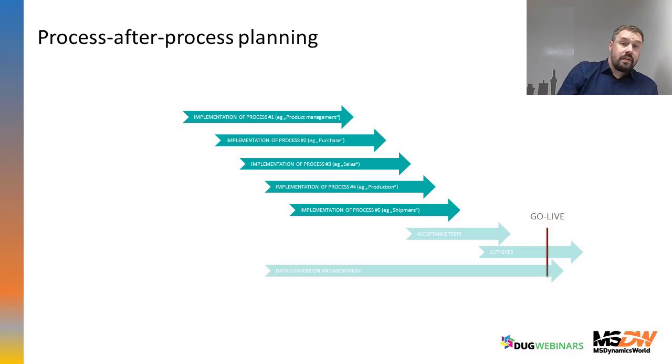And this is a closed process. It has its start and finish. So you can implement and develop this process alone and give it to the customer, and then you can start with the purchase process, the sell process, the production process, which needs to have something purchased.